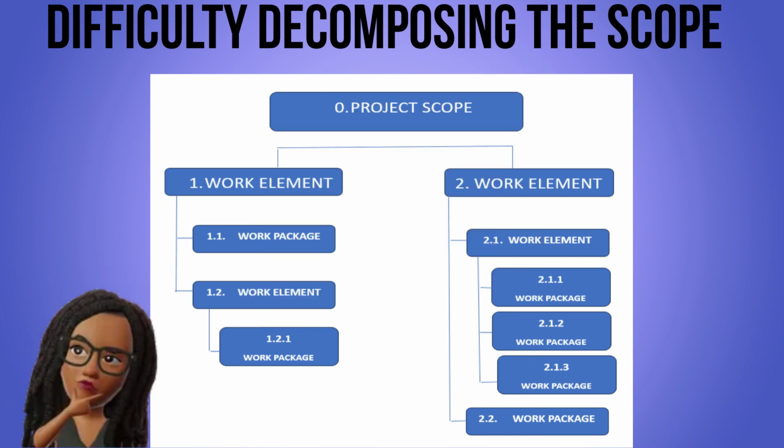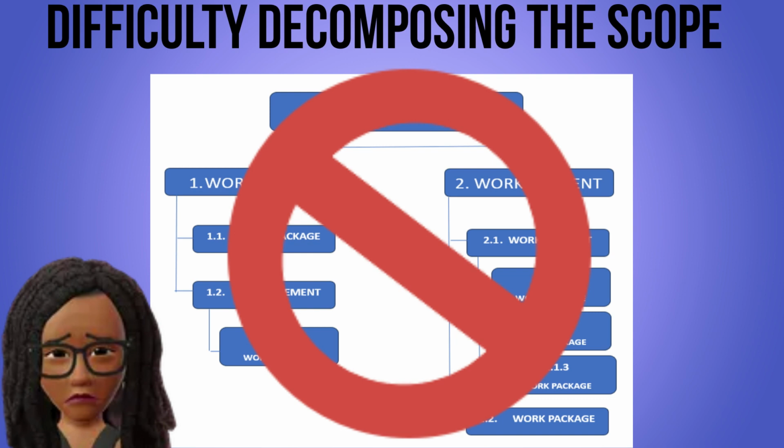A situation like this requires revisiting the scope and consulting with the relevant stakeholders for greater clarification. Do not, I repeat, do not try to force your way through the process if any part of your scope is resisting the decomposition process.